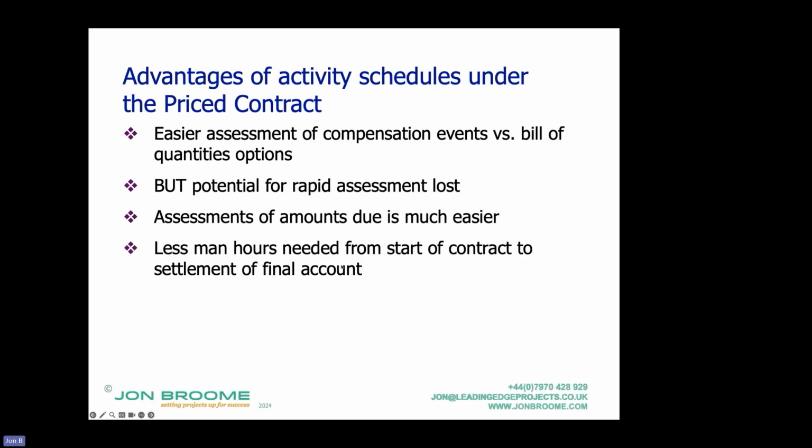Lastly, before I answer Zach's question, there are fewer man hours needed from the start of the contract to the settlement of the final account. This is partly due to NEC, if operated, I won't say absolutely correctly, but pretty much more correctly. Compensation events should be resolved as you go along. Because of the easy assessment, based on program, there's a correlation with program.